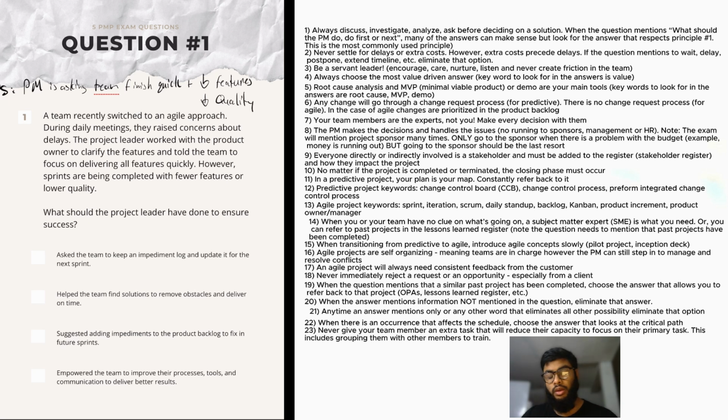Awesome. So this is really interesting, guys. Actually, you can take note of this. Before every single sprint, there's something called the team velocity. It's how fast your team can actually move, meaning how fast can your team produce what is required, what has been stipulated in the sprint planning meeting. If you tell your team all of a sudden you have to finish quicker, it ruins this velocity, it ruins this flow. So naturally, you are going to have lower quality features. And you might even have fewer features because people are just overwhelmed. So what should we do?